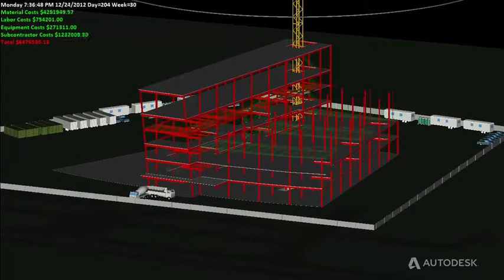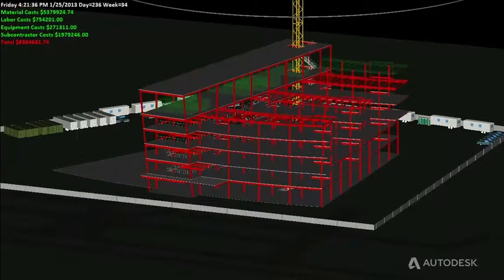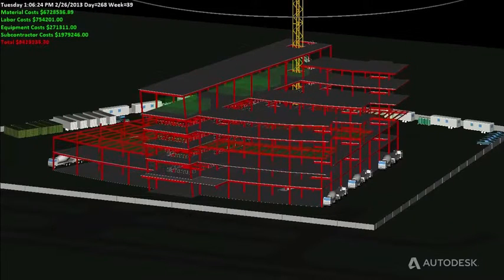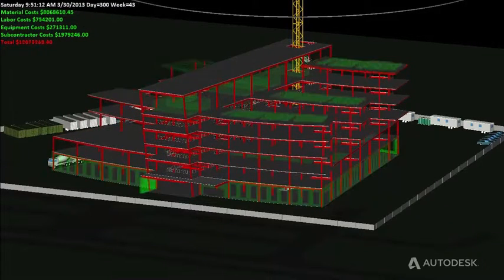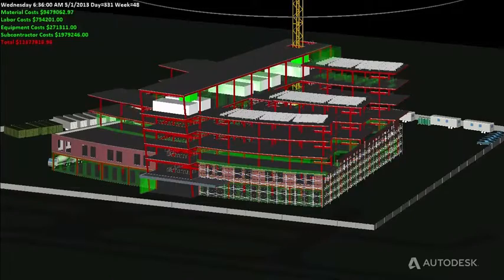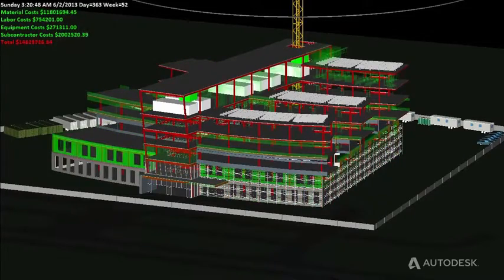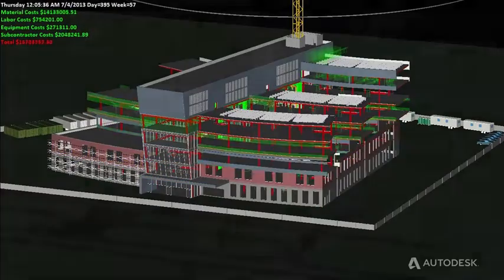That cost information can then be displayed within your 4D analysis, creating a fifth dimension of data that helps you better understand the impact certain tasks will have on budgets at any given time.